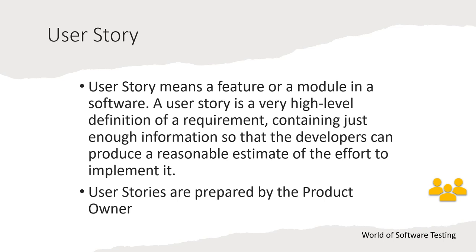The third artifact is the user story. A user story represents a feature or a module in the software. It is a very high-level definition of a requirement containing just enough information so that developers can produce a reasonable estimate of the effort to implement it. User stories are prepared by the product owner.